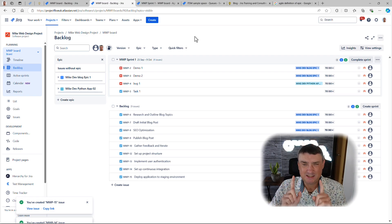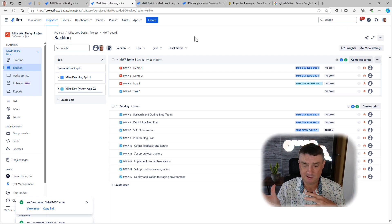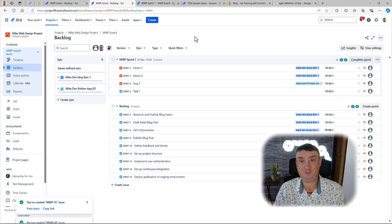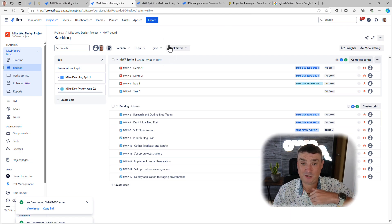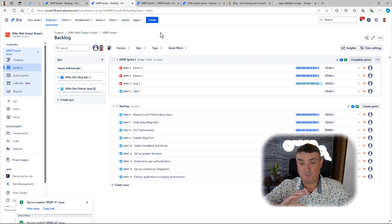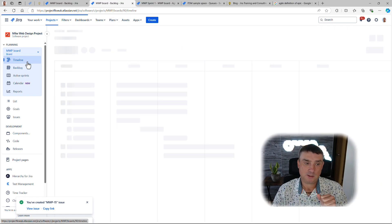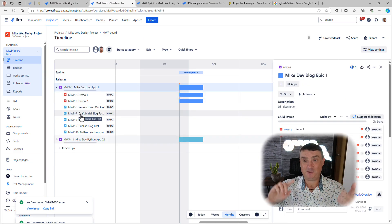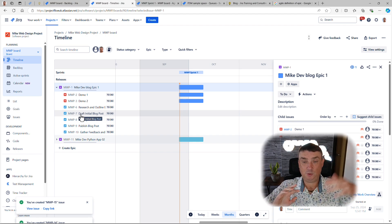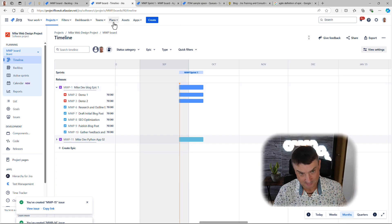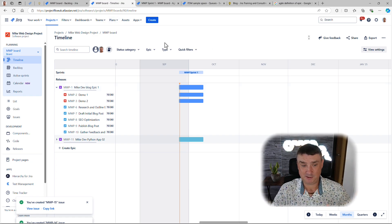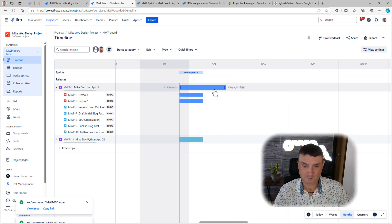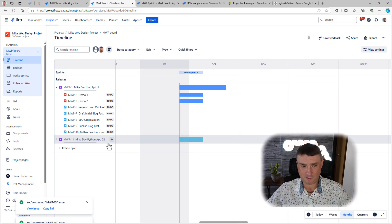We've covered how to create and use epics, but there's one extra reason I highly recommend using them: the Timeline view. There's no definitive 'right or wrong' way to use epics, but there is a massive advantage to using them over components or custom fields — especially if you have Jira Premium. The Timeline view relies heavily on epics: if an issue is not linked to an epic, it won't show on the timeline. Timelines are really powerful for tracking sprints and progress at the epic level.